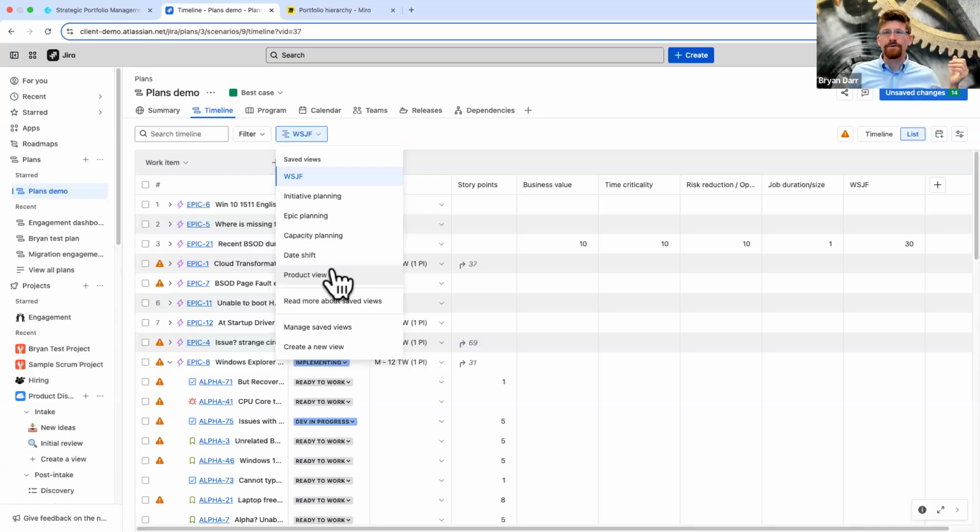And you don't want them questioning the prioritization of that, right? Like, how can you prioritize a new feature versus a security update? They're both very important things. And so it just comes down to capacity. So we need to be prioritizing the new features over here. We need to be prioritizing security updates over here. And then it's up to the teams and the product owners to blend those in the backlog based on team's capacity. So we do that in plans.